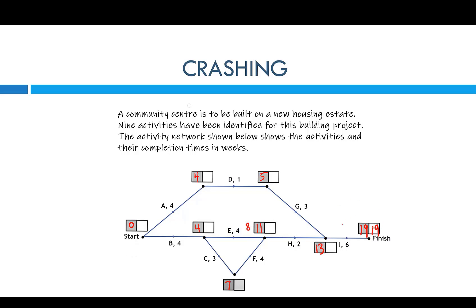Nineteen minus six gives me thirteen. Thirteen minus three gives me ten. Ten minus one gives me nine. Then nine minus four gives me five, but going backwards we've got to get the smallest way back. Now at thirteen minus two gives me eleven. Eleven minus four gives me seven. Eleven minus four that way also gives me seven, but seven minus three gives me four. So I've got seven there but I've got to put four in because I'm going the shortest way backwards. Then four minus four is zero. See how you had five before, but we want the smallest way to get back, and that's zero.